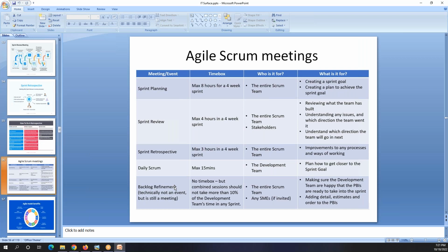Who says that I need this job done before all of my other stories? The product owner? That is correct. The product owner is the person who prioritizes these stories in the backlog. And during this meeting, they will pick some of the stories they need to work on urgently in the same current release or the next release. In that way, the product owner can prioritize the stories.